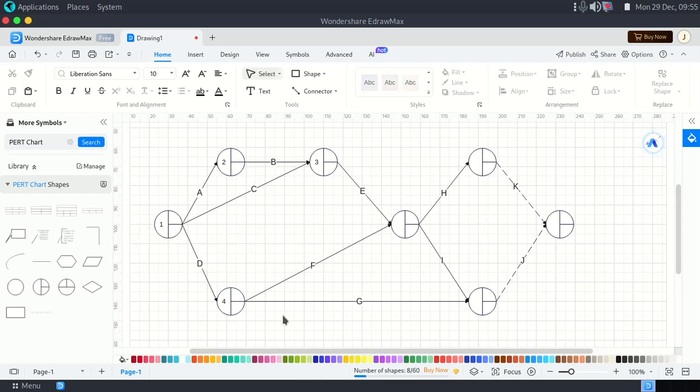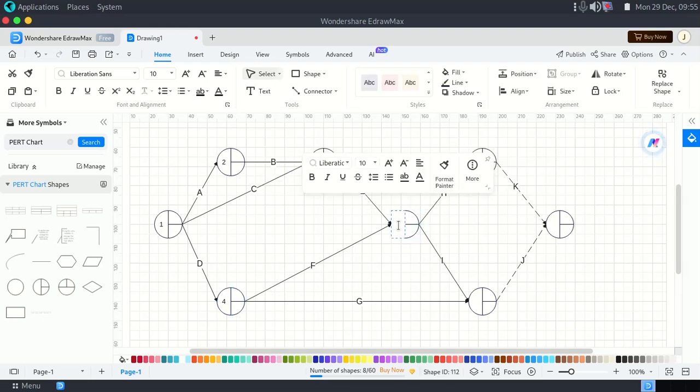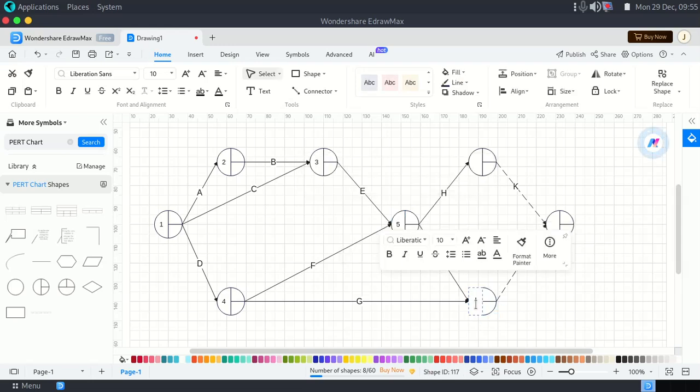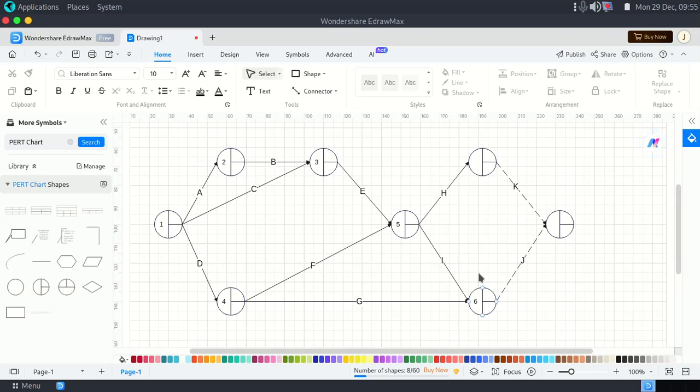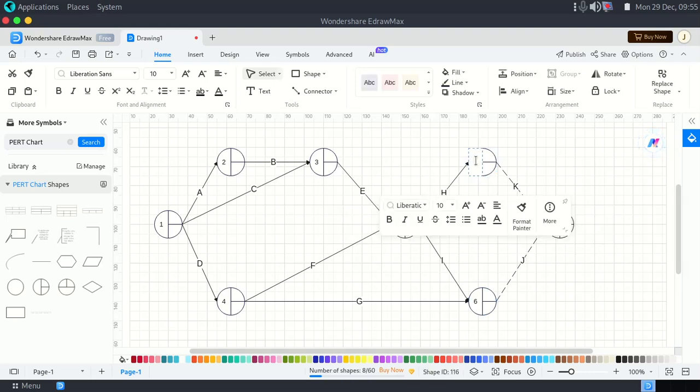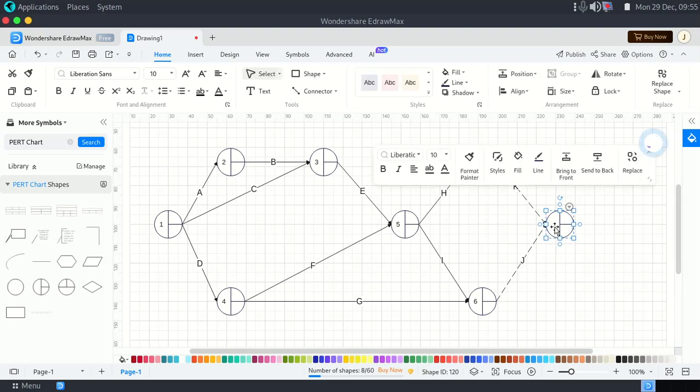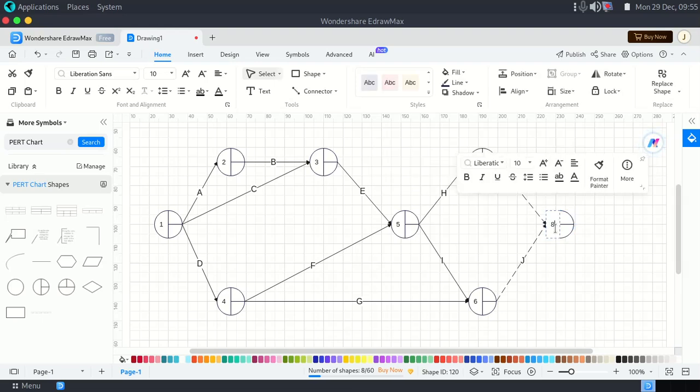We go to E. So this is our E. E becomes node 5. F again is this same node, so we skip. So we go to G. G becomes our node 6. Now we go to H. H becomes our node 7. Then the last node we can see is this one, which will be 8.